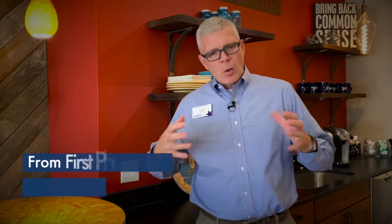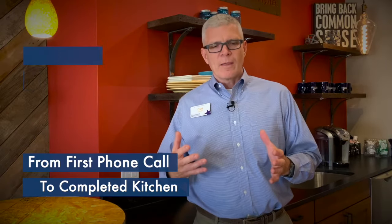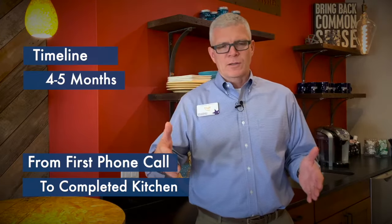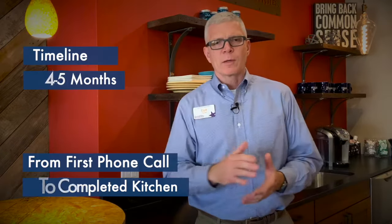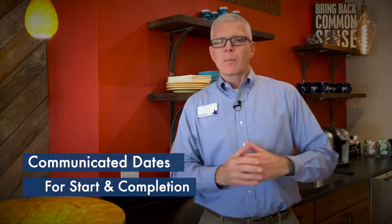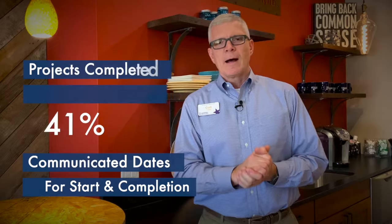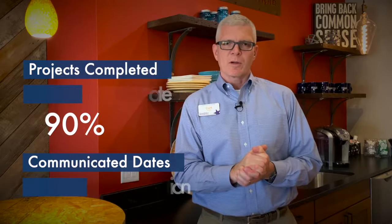So when somebody starts talking about how long that entire process takes, I usually indicate that it's going to typically run them from about 4 to 5 months from the start of that phone call all the way through to completion of that project. And schedules are really, really important to us. We provide our clients with an anticipated start date as well as a completion date. And of our projects in 2020, we hit almost just shy of 90% of those projects hitting that completion date. So we're pretty proud of that record.